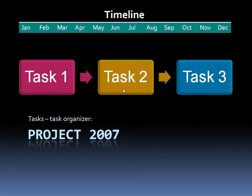The tasks are usually tracked on a timeline, where each task is allotted so much time, like in hours, days, weeks, or months, to be completed. And if one task takes longer than its set time, then as a result all of our project will extend beyond its due date and, of course, be late.